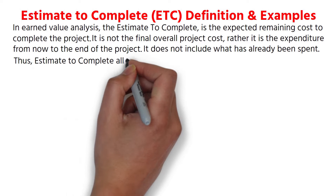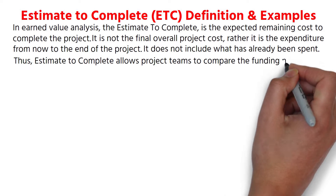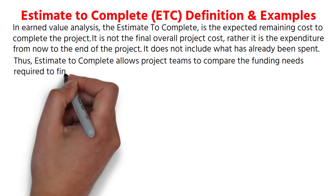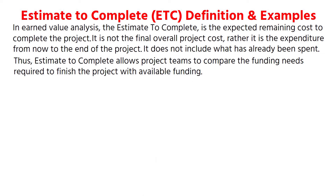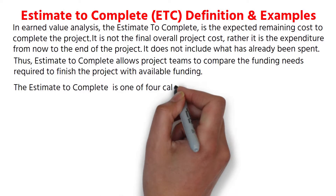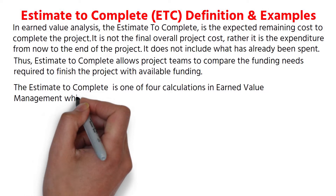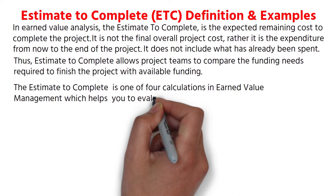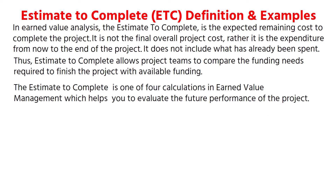Thus, estimate to complete allows project teams to compare the funding needs required to finish the project with available funding. The estimate to complete is one of four calculations in earned value management which helps you to evaluate the future performance of the project.